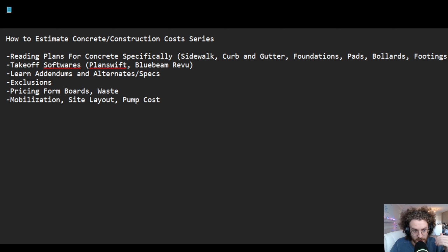That's where you can cover your costs. Site layout is a cost associated with bigger projects when you're doing a lot of layout on sidewalks and curb and gutter and all this stuff. You're going to pay a company to come out, stake it, and figure out where everything's going. It's going to cost you a little bit. That line item, you kind of figure out what it costs.